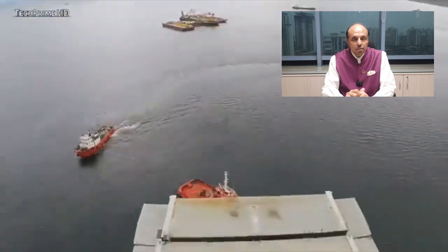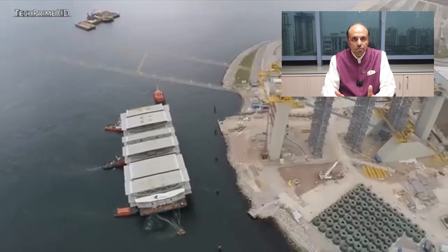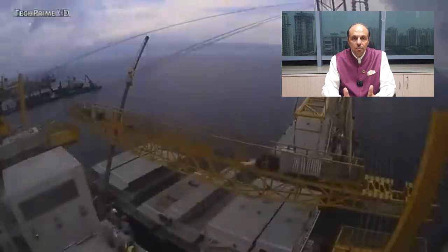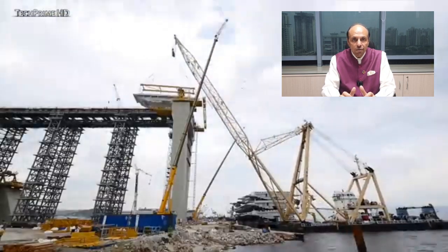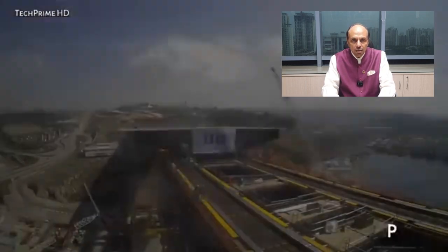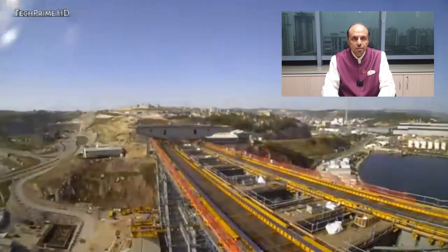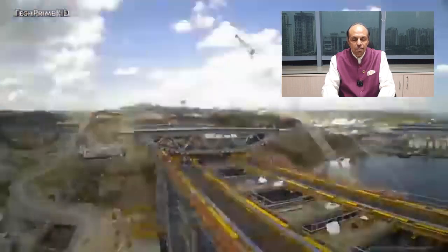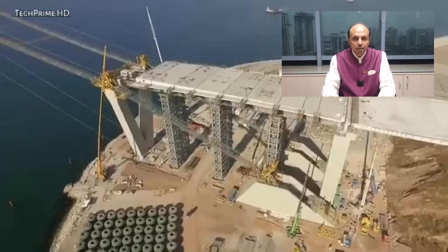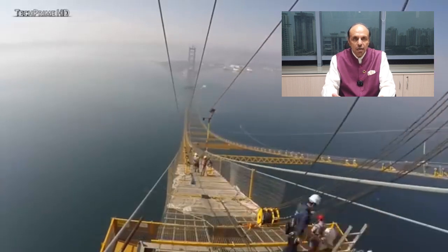The revenue risk for the projects which are ongoing, in operations mode, or being planned will have to be reassessed, because the tariffs are likely to cause global slowdown of the economies worldwide. And with that, the fare box or the toll plaza or the collection as such, which is being planned for any infrastructure project, the user fee, it may not accrue as per the plan. And that is going to impact the entire profitability or the bankability of the project and the repayment. And the projects may become non-performing assets.